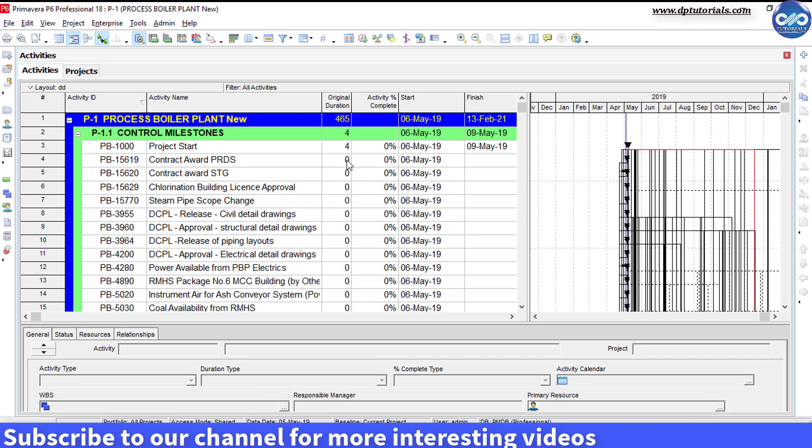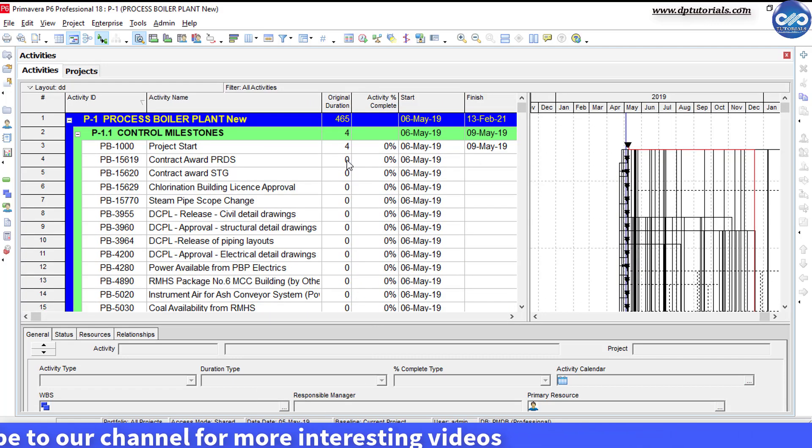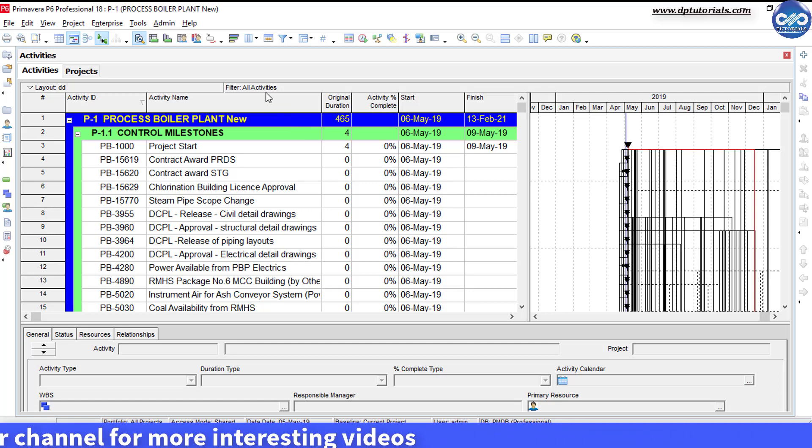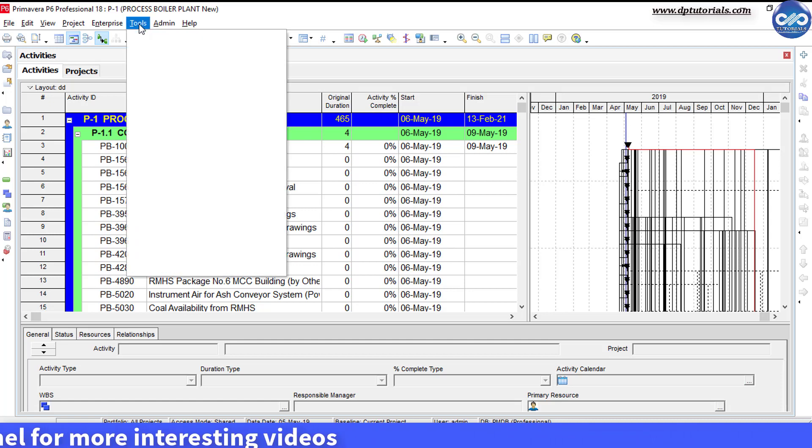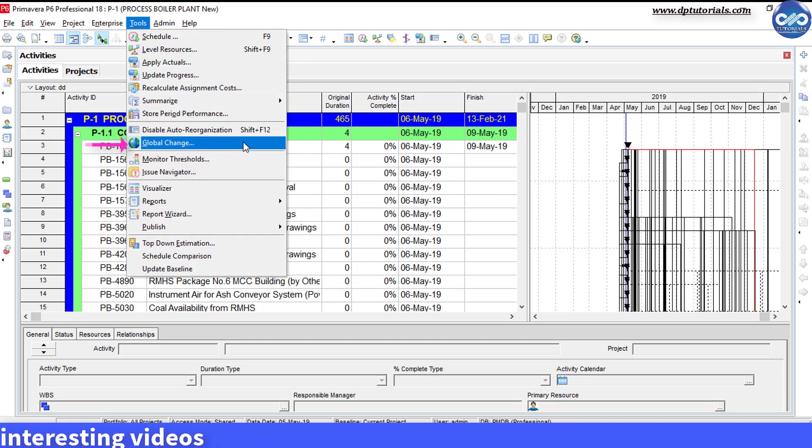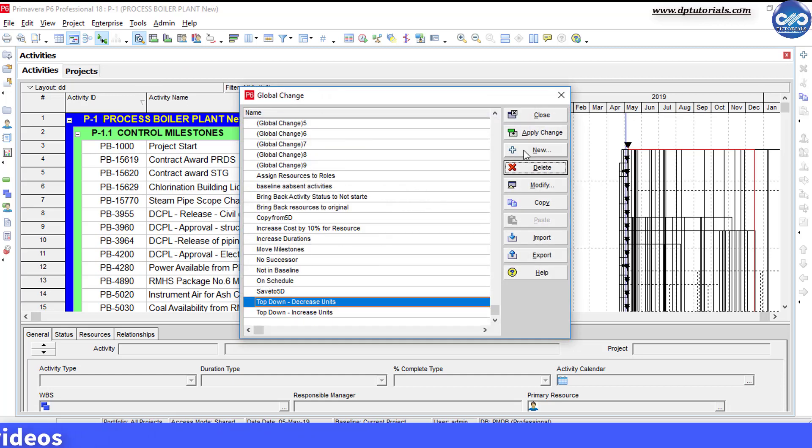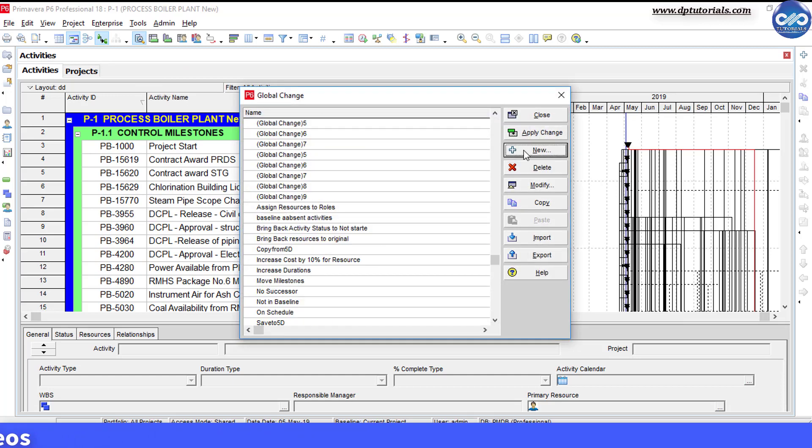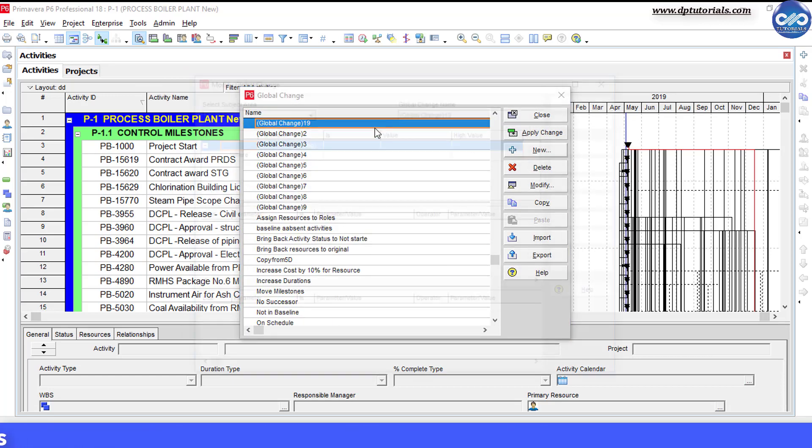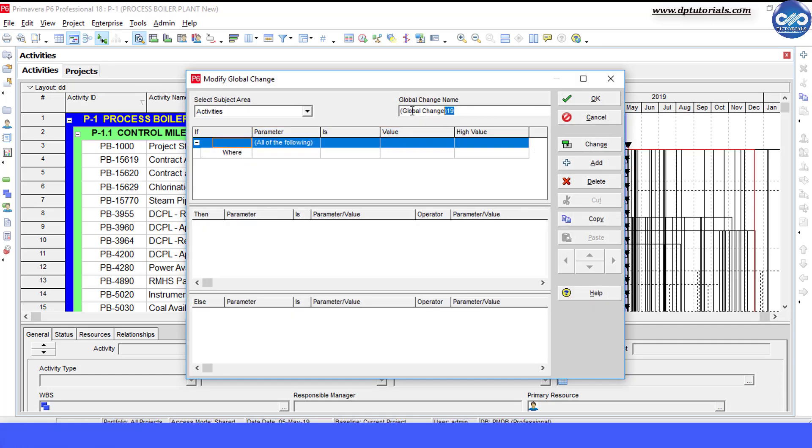So first step is, I define a global change. Go to tools, click on global change, give this global change a name, say it as schedule crashing.